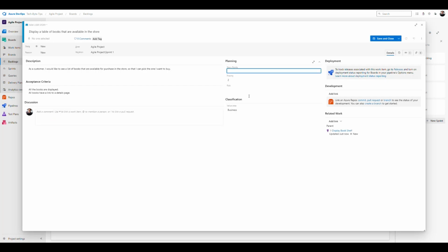And in here is a little bit of a difference. You have these story points that get assigned to the story. This is usually done in one of the agile ceremonies, which is the planning poker ceremony. Or, well, that's usually what most organizations do, but it could be done in many ways, where the team gets together and discusses a story, and then they assign an amount of points that references what they believe is the level of effort that this story demands.